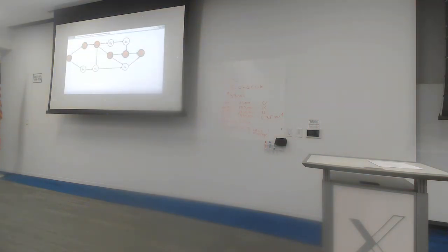In this tutorial, we're going to look at project acceleration, also known as activity crashing. What we have in front of us is a project network diagram that has already been created. We can see all the different activity precedences. We can see the critical path because the critical path method has also been applied, and the critical path at the moment is A, C, E, I, and J. The numbers show the durations of all the different activities as well. If you're interested in the critical path method, that's been dealt with in a previous tutorial, so go back to my YouTube channel and look for that tutorial to help you out.